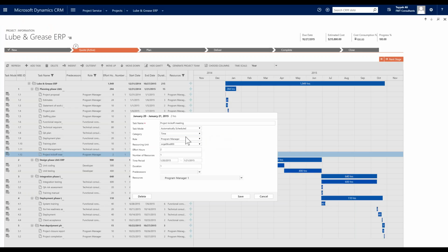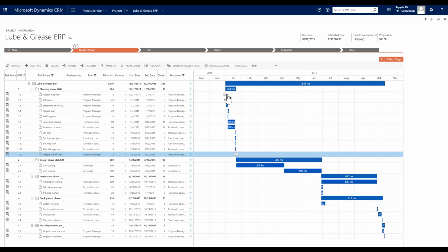Now, by selecting from the different categories, we can have milestone billing, and that would actually say that this task, once it's identified as being a milestone moment, would then trigger on the dashboard that we've gotten to all the various stages and have contracting, invoicing delivered to the customer for this project automatically.